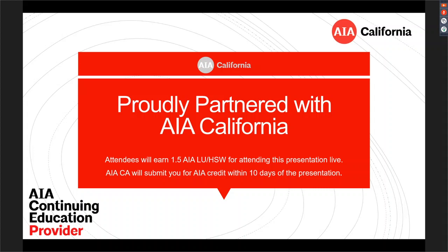So no, if a structural engineer is submitting the NMA, their stamp and signature, because they're the one making the determination that this is non-material. The architect, I should say the DPO, design professional of record, doesn't need to get involved. The design professional of record does need to sign the drawings, even though the structural engineer or electrical engineer stamps and signs the drawings. Again, that's in 7-115. But not on the form. The form can be whoever's making the change.